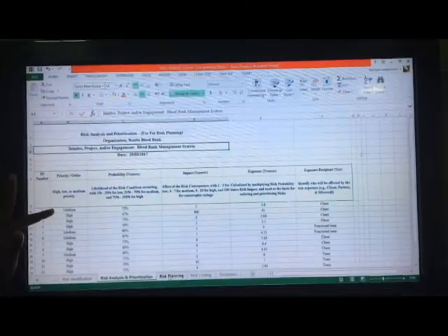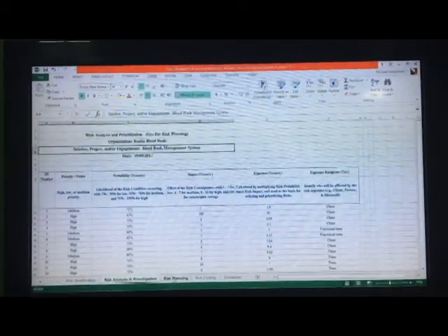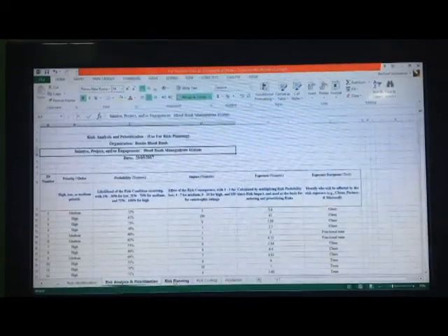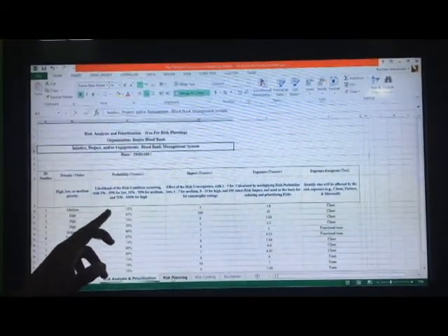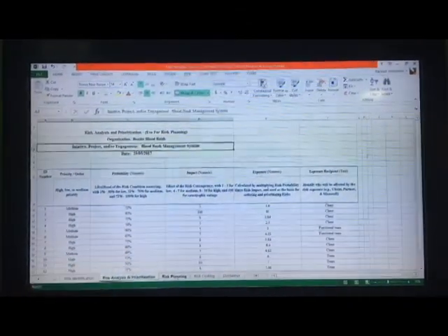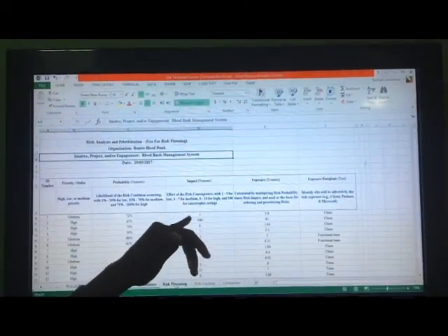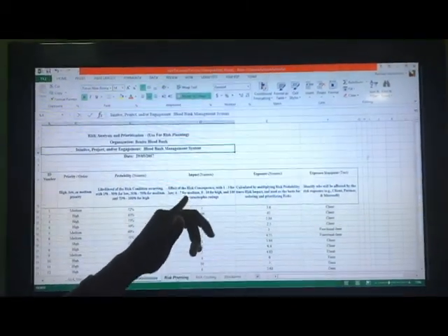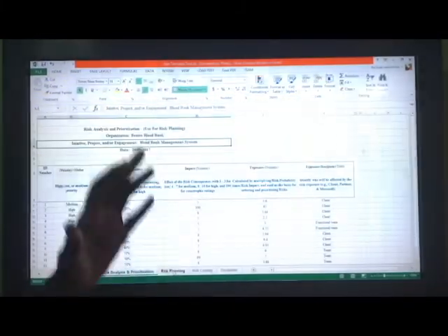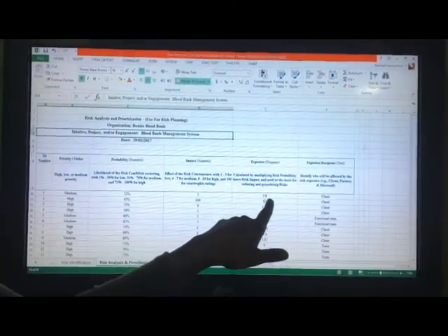This will be given a priority of medium because it happens, but it happens at the user side. There is really not much you can do to determine what the user sets as his or her password. So the probability of this happening is very high. That's why it was assigned a percentage of 72. The impact of this risk was given a numeric value of 5, which falls in the category of medium. And the exposure was calculated by multiplying 72% by 5, which gave us 3.6.